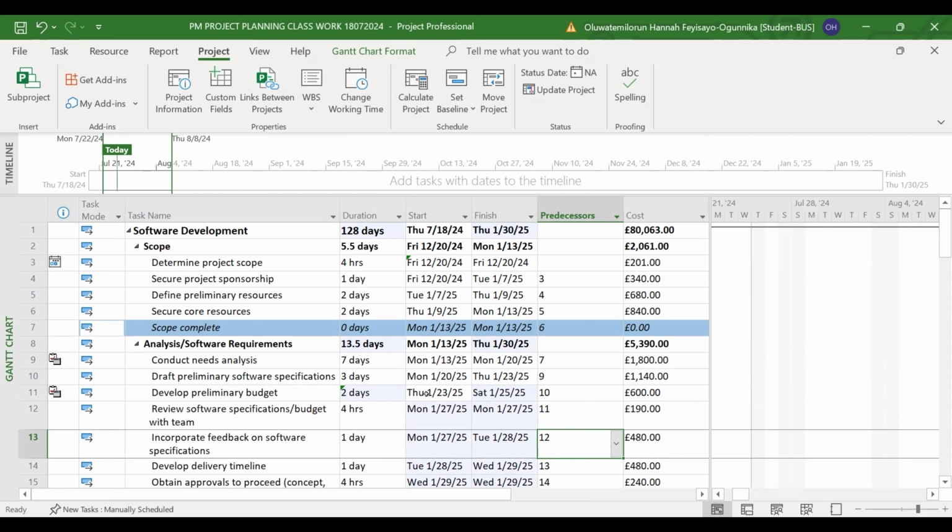So one thing I discovered now, like I said, I learn every time. You might need to start putting your calendar before you add your resources. That is what it's trying to tell us: because we've got resources attached to it, the resources are making the calendar not show weekends. So the best thing to do is not to assign resource to that. Never knew that. I always do it with resources attached or on the normal day.